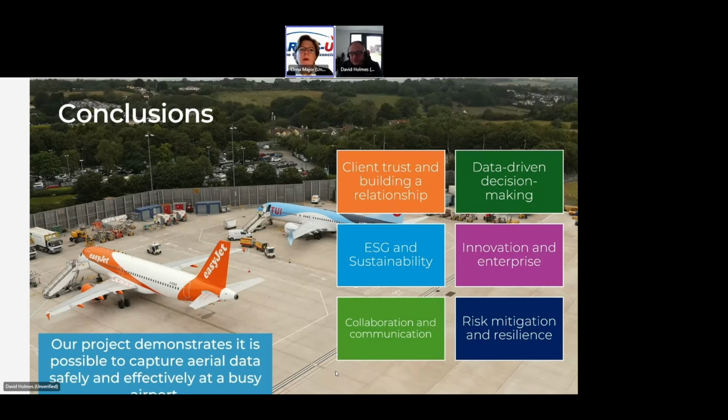Sorry to interrupt you, I think I'd just go on to say that you need to know within the airport who's responsible for what job, because the person who commissions the piece of work doesn't necessarily always give you all the information for who you need to contact for the airside safety stuff. So that's really important.